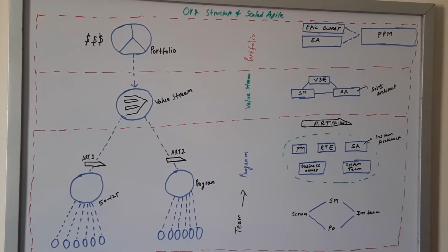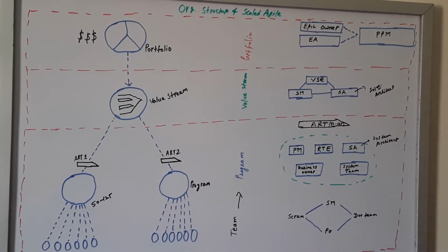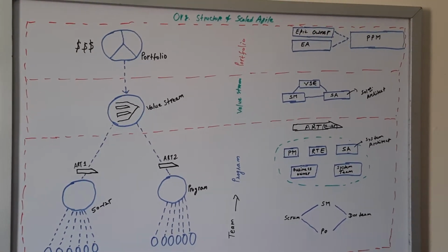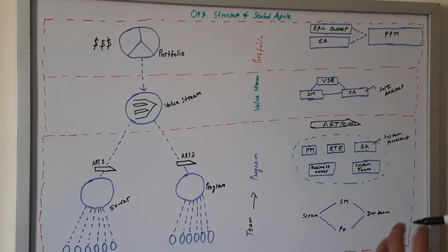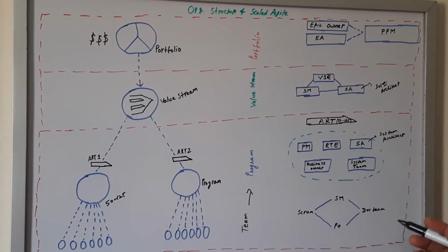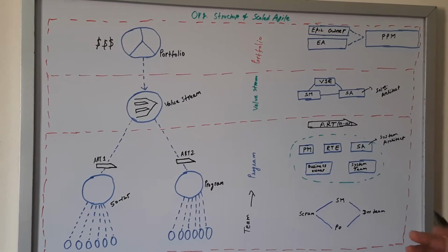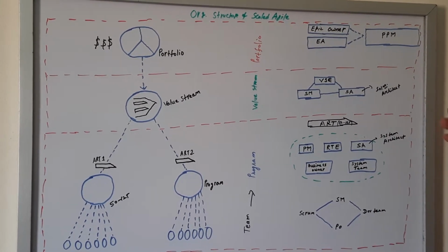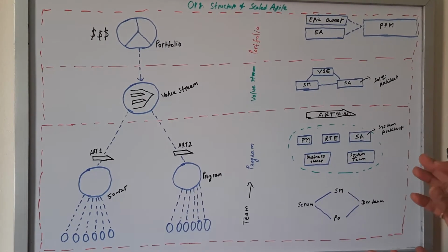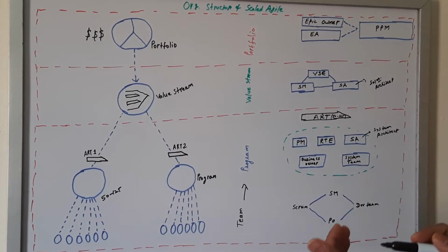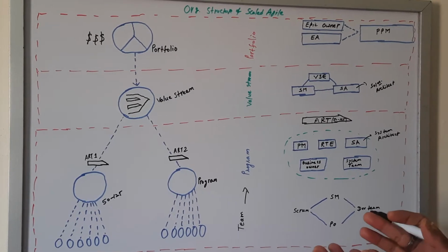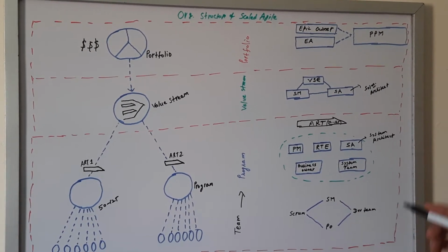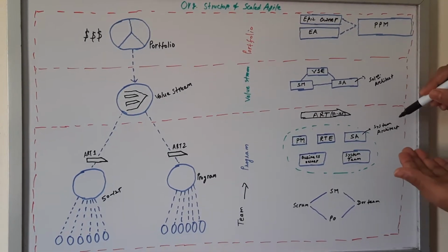Now, the System Architect. What is the role of the System Architect? As we know, Scrum is a self-organizing team, and in a self-organized team, the team itself designs the architecture. But when you have a grown-up, large team size, to align with your system architecture and to assess the impact of your system-level changes, you have a role defined as System Architect.